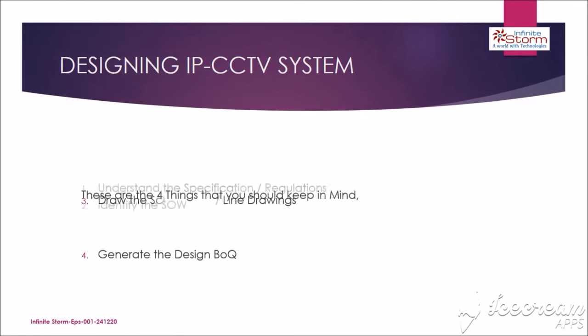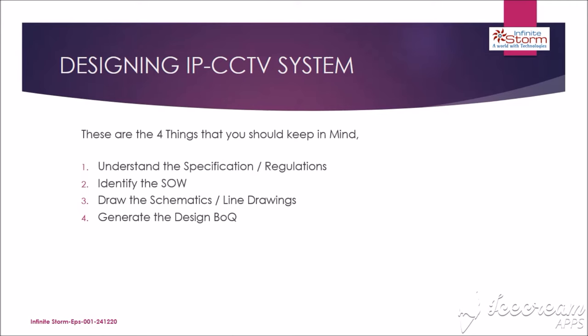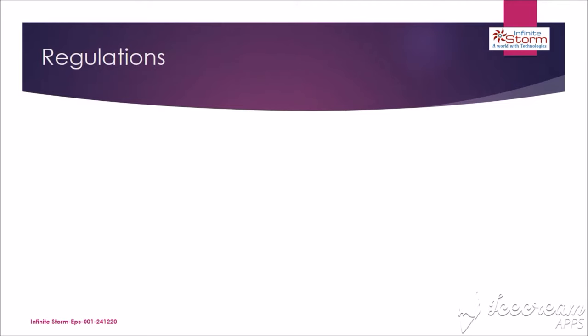For designing an IP CCTV system, the designer or estimation engineer should keep the following points in mind: read the complete specification and scope of works; review security regulations, which will be discussed in detail in the next portion; draw a basic schematic to understand how the CCTV network architecture will be and what materials are required; and generate the BOQ by listing out the bill of material quantities.